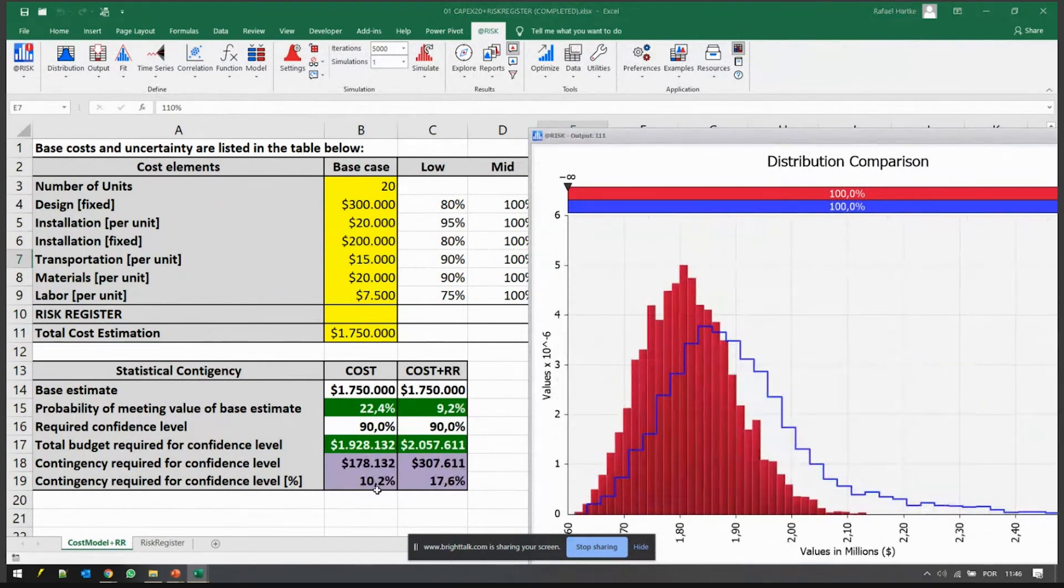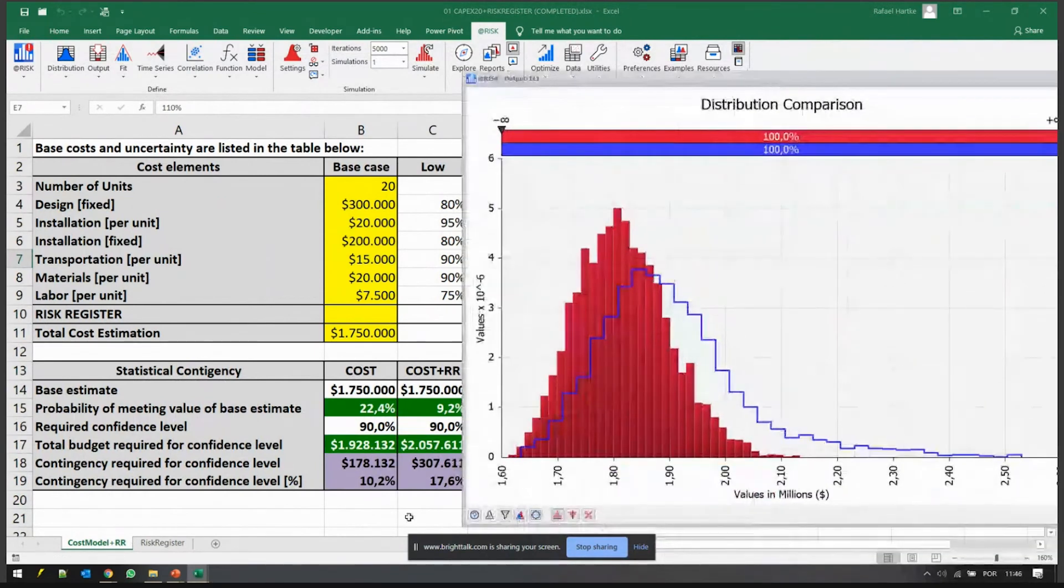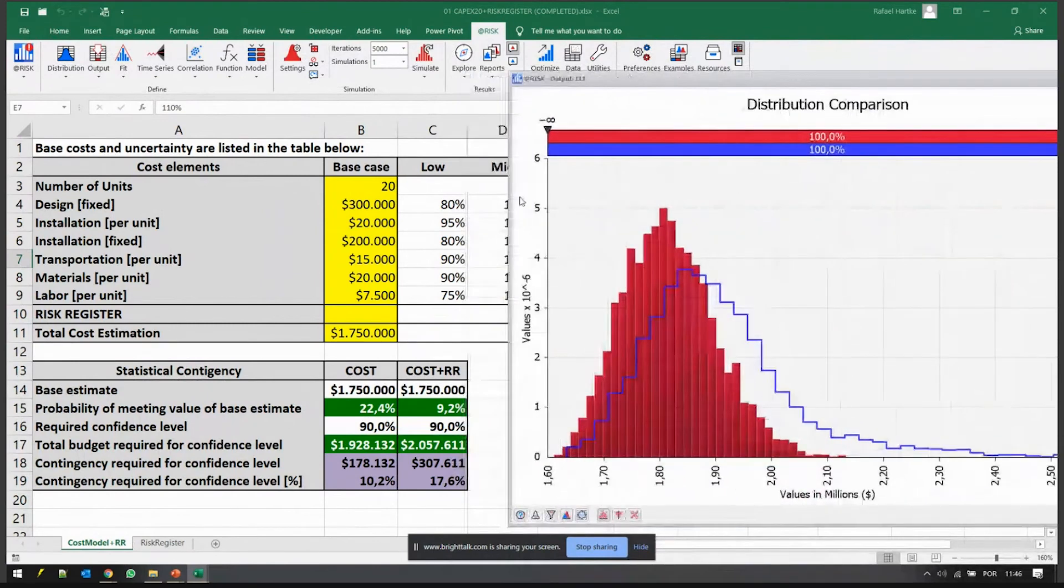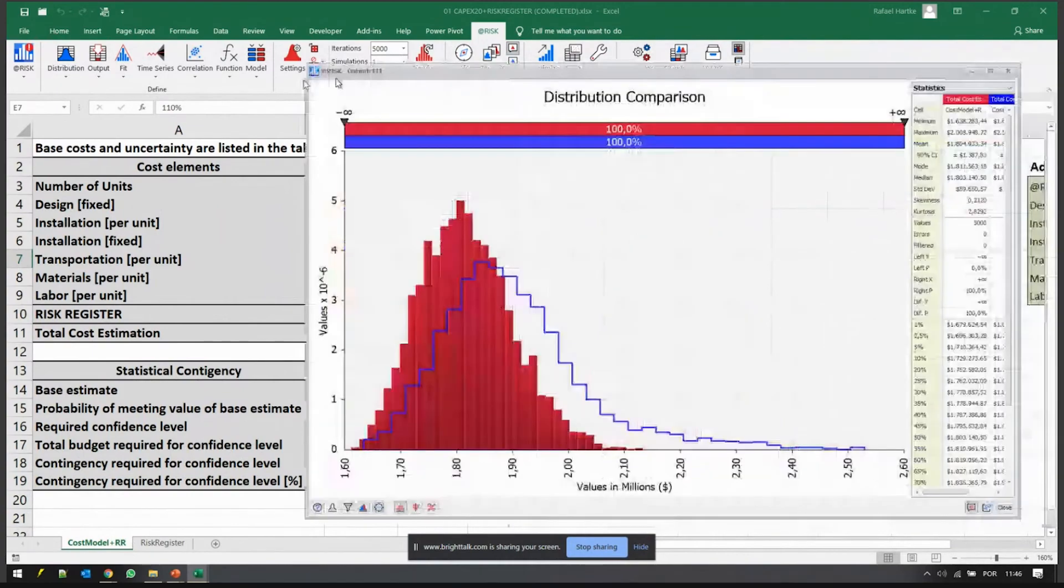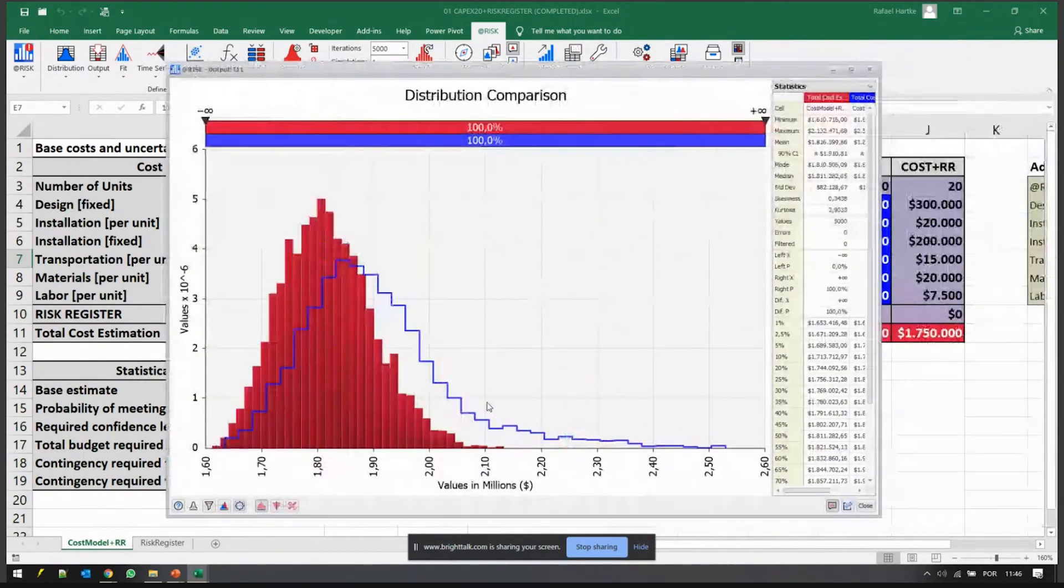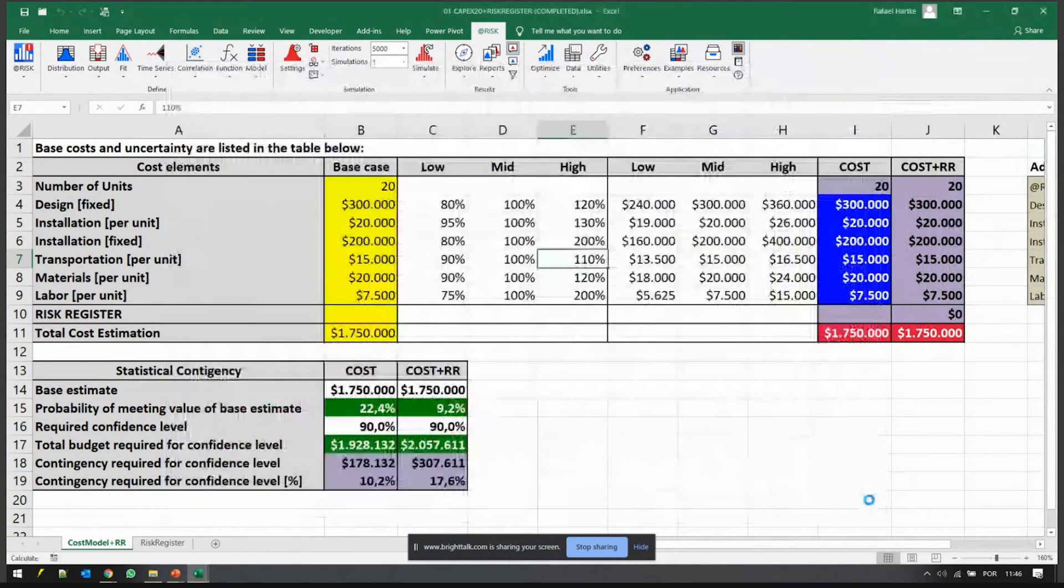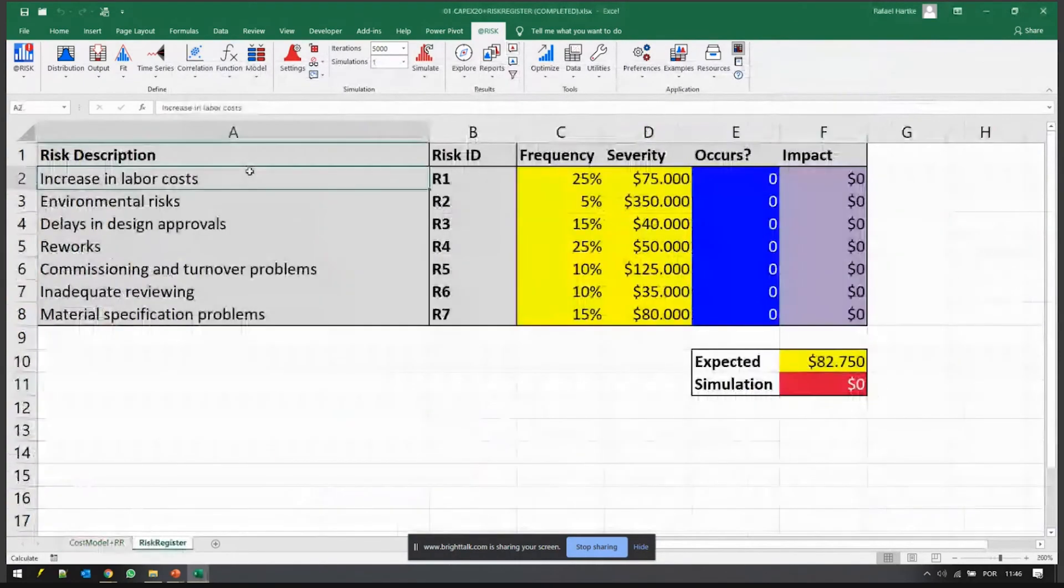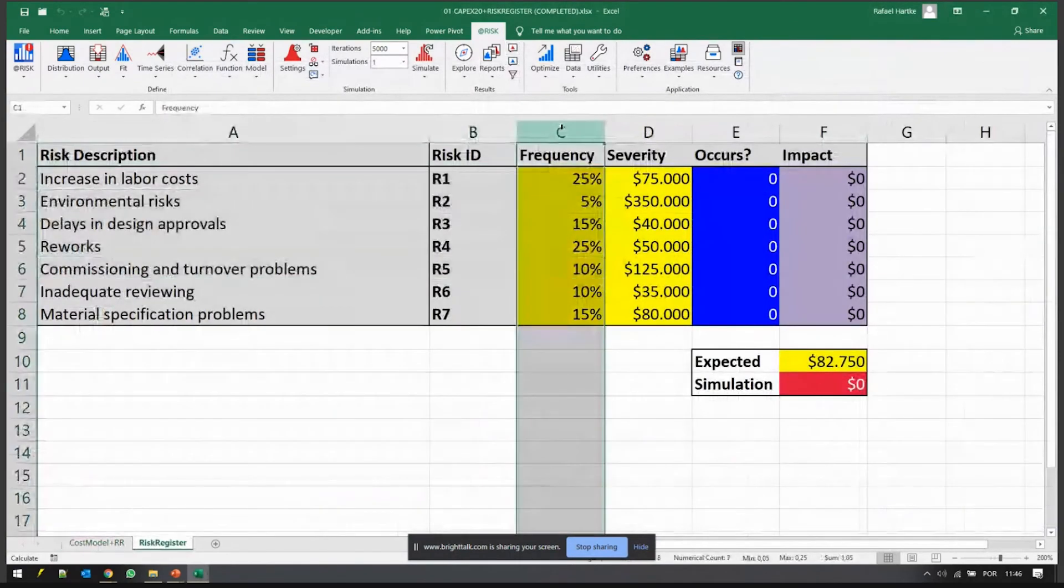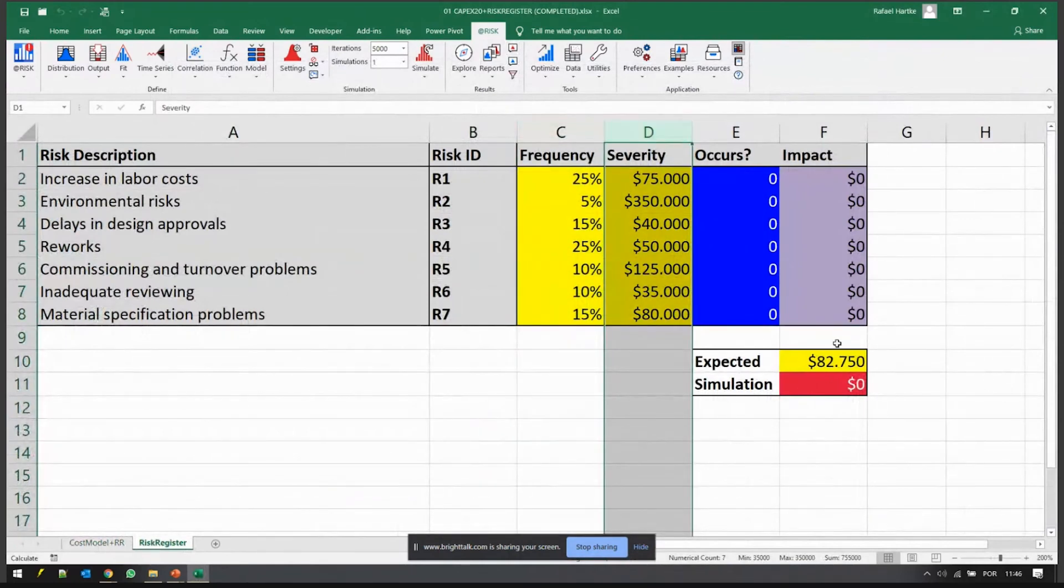I could be including opportunities too, by the way. The contingency jumps from 10% to 17%, so almost doubles because of this extra risk that comes from outside. Those are all risks that maybe I can mitigate. If I come here and think about mitigation strategies, ways to reduce the probability or ways to reduce the frequency, I will impact my contingency back there on the first page of the project.